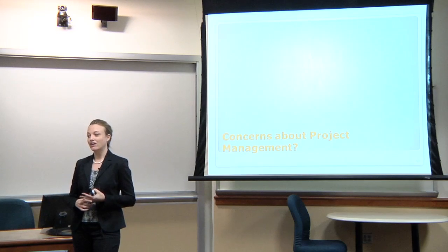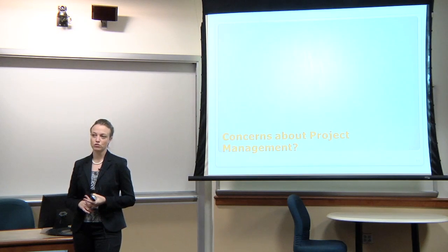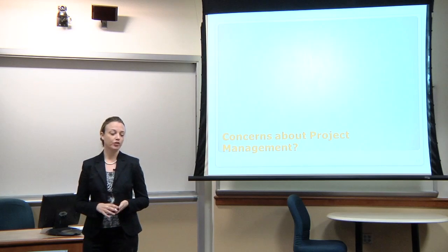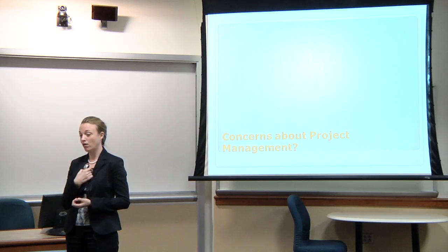Okay, so the question is how do you make the decisions about what spacing, amount of time per task, and quite honestly, this is a little bit of trial and error. Some of the things that you can do is you can talk to your client about how long things have taken in the past. You know, has someone done a project like this for you before? How long did this piece of it take? You have resources. I mean, I'm always here as a resource.